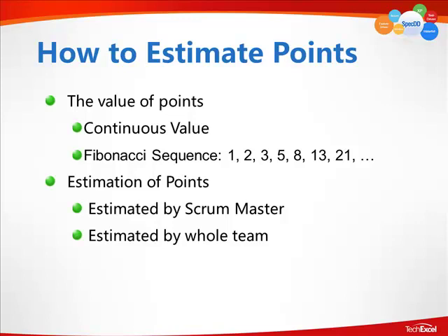There is also an alternative style that I have seen used by a couple of teams through the means of poker cards. Your typical deck of cards. So it is a continuous value, 1, 2, 3, 4. However, once you reach the faces, the jacks, queens, kings, then you have a much higher point value system for those. So it's kind of almost a combination. You have your continuous value, and then once you get to the jack, queen, kings, you have not a Fibonacci sequence, but something that gives a more weighted value the higher you go.